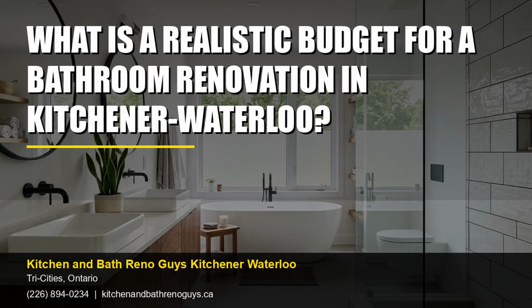How costs compare across Kitchener, Waterloo, and Cambridge. When planning a bathroom renovation in Kitchener-Waterloo, understanding the cost differences between the cities of Kitchener, Waterloo, and Cambridge is crucial. In Kitchener, where many homes are located in older wards, a bathroom renovation can range from $15,000 to $30,000. The older housing stock often means dealing with outdated plumbing and electrical systems, which can push the costs toward the higher end of the spectrum. Engaging a knowledgeable bathroom renovation contractor in Kitchener can help navigate these challenges and keep your project on budget.